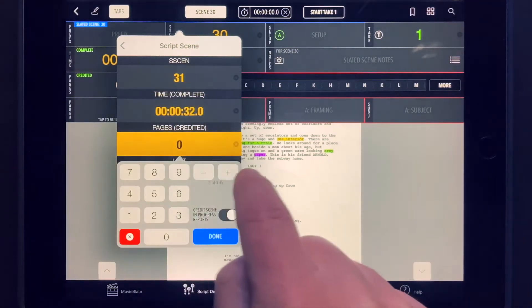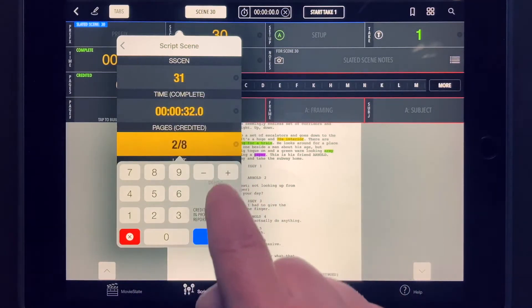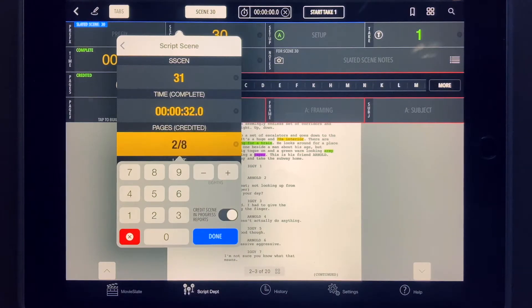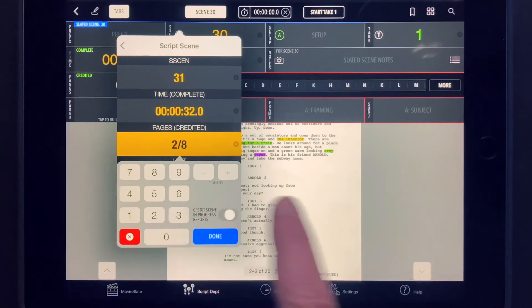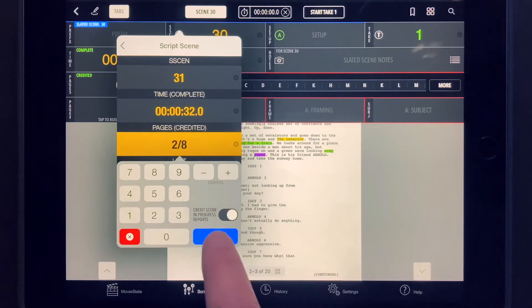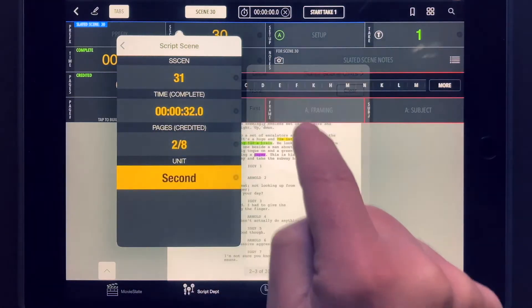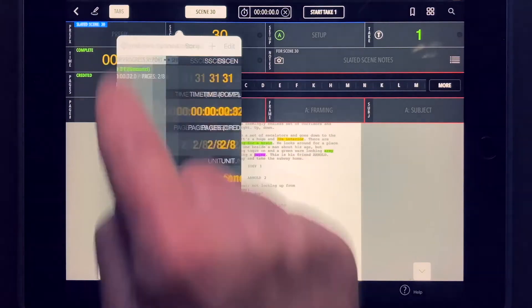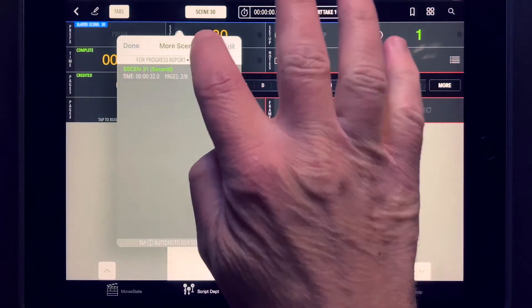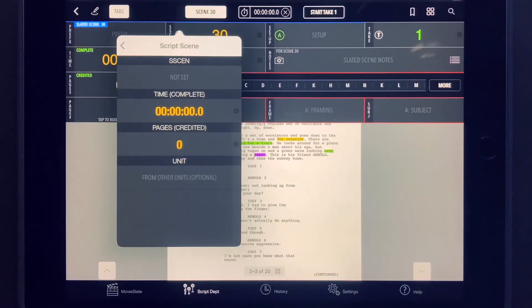To choose whether to credit the additional scenes in your progress report, tap the Pages field, then enable or disable the Credit Scene and Progress Reports switch. Each additionally shot scene has its own unique credit scene and unit values.